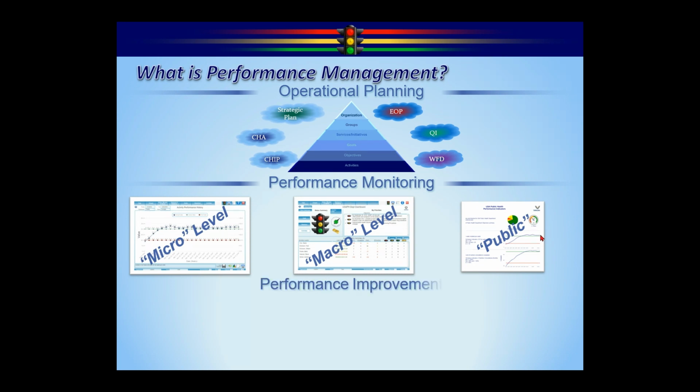Now, the reason that performance monitoring is critical is because of the PDCA cycle. So as you're executing the plan, you're through that real-time planning, you're updating the plan. So everybody who's been assigned as an objective activity lead is going in and doing the updates on the plan. And we count on those updates to be able to generate the charts and graphs and such so we can determine in the check phase, are we on target? Are we behind target? Are we ahead of target in here? So the performance monitoring tools are used at the check phase to determine, are we on track? So if we need to make adjustments, we can do that.